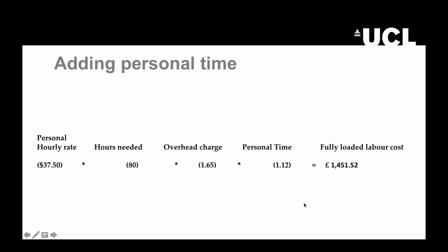But even if we want to do a more realistic allocation, we should consider this factor, the personal time, as we can assume that no one truly works a full 8 hour day as part of the job. This is basically an allowance for a reasonable degree of personal time during the workday. This is simply a recognition of the need to make personal calls, have a coffee break, etc.